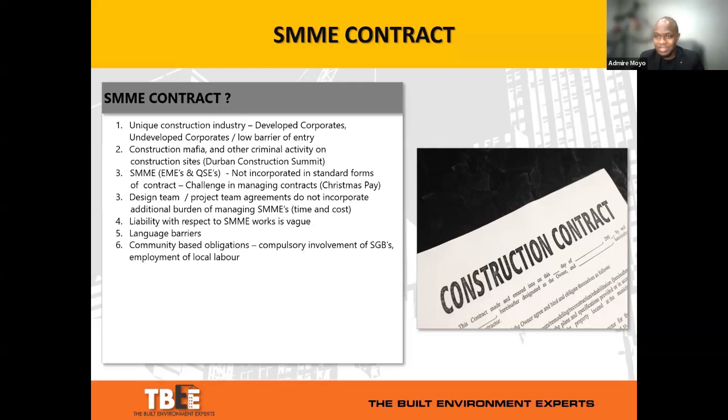Standard forms of contracts don't necessarily apply in the South African context, and where you try to apply them, you find yourself forcing certain issues because there are various role players within the South African construction space whose roles and responsibilities are largely undefined. You've got SMME contractors as a case in point. You look for the term SMME, for example, in a JBCC agreement, you don't find that. You look for the roles and responsibilities of an SGB in a standard form of contract, you don't find that.